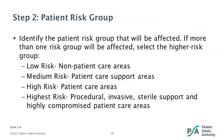Continuing to step two, you will be determining the patient or resident risk group. You're identifying the individual risk group that will be affected — if you have more than one risk group affected, you should select the higher group. The groups are divided into four possibilities: Low risk — non-patient care areas; Medium risk — patient care support areas; High risk — patient care areas; and the Highest risk — procedural, invasive, sterile support, and highly compromised patient care areas.